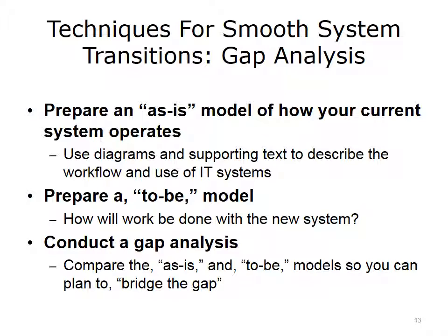You can use scenarios developed in the requirements specification as a starting point, and use these to define the to-be operations. In this technique, we are contrasting the as-is or current operations with the to-be operations, that is, those that are associated with the new system and workflow and processes. For both as-is and to-be representations, consider using already established modeling technologies. There are flowcharts and simple graphical techniques that are used, but there are also more representative models available, such as the UML, the Unified Modeling Language. This can be an effective technique for you to capture the as-is and to-be representations.